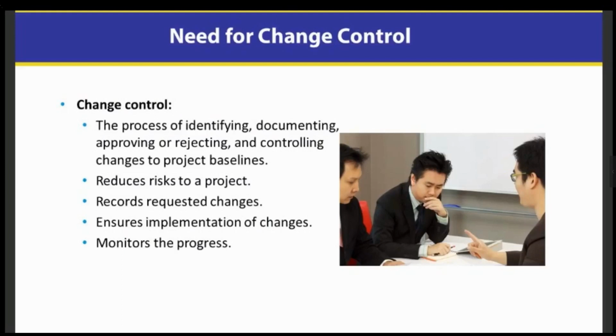Okay. And then it records those requested changes, and we may or may not do it, but we have those documented. So, and this I'm sure would never happen in your organization, but somebody might ask for something and we say, no, that's denied. We're not going to do that in this particular project. And then they say to their friend, you go ask for it. Maybe they'll like you better. And then that same person asks for the same thing, and we go, wait a minute, this has already been asked for. We're not going to do this. We've already denied this. So you've got documentation of the things you've already disapproved and the things you've already approved.